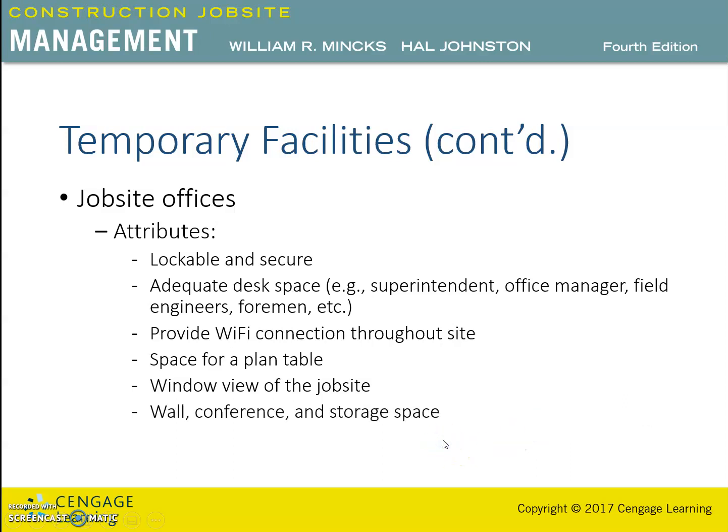Wall space for the project schedule. A schedule that is used by the contractor usually is very visible and accessible in the job site offices. Updates and changes normally are posted on the schedule. The more readable and accessible the schedule is in the job site office, the more it is used as a tool to manage the project.